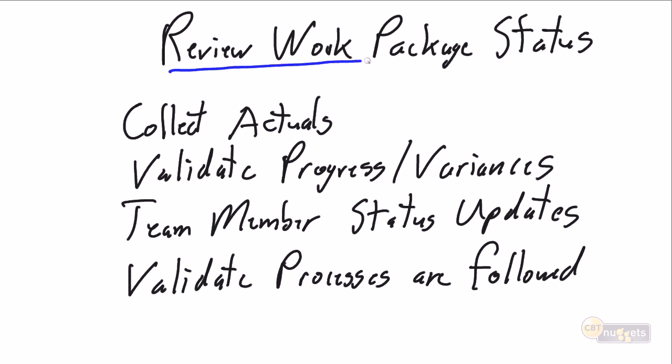So with the work packages assigned, the next key activity that we're going to do as the project managers is to review the work package status. Validate that the work is being done, and Steve's term for doing that is to collect the actuals. Okay, you told me you were going to do this task in 16 hours. We negotiated. We've agreed that it can be done in 16 hours. How are you doing? At the end of the first week, how much time have you spent on the task?